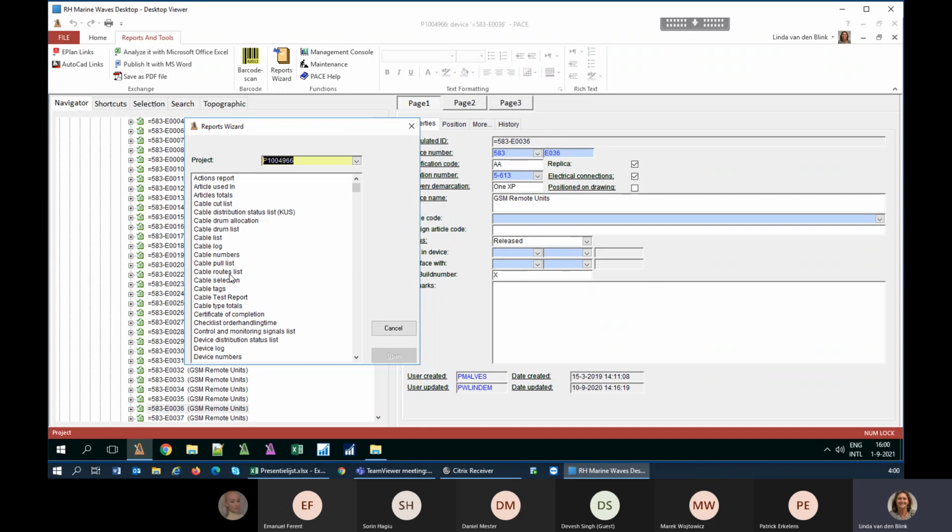So if I want to pull cables on board of the ship, what I have to pull today will be less or more tomorrow, depending on if you pull your cables today and you change the status, tomorrow they will be no longer on your pull list because you already pulled those cables.